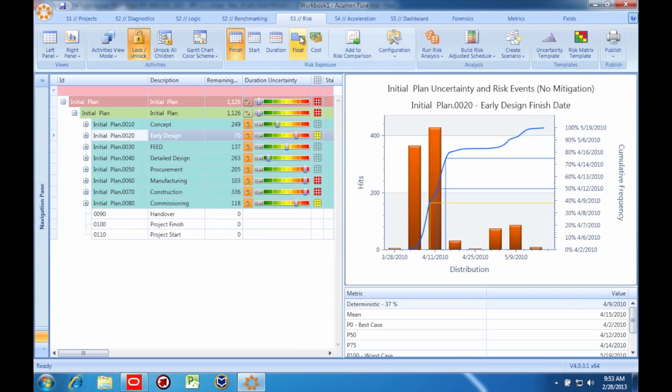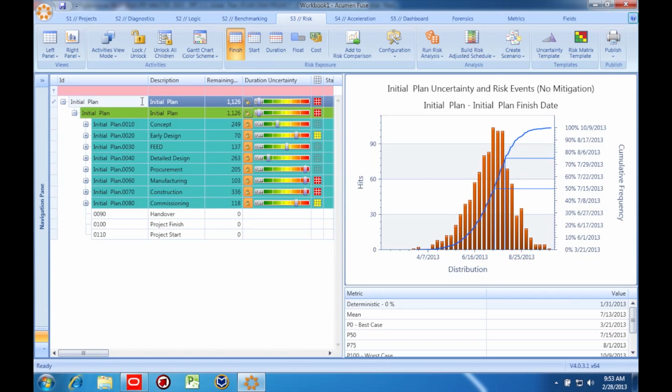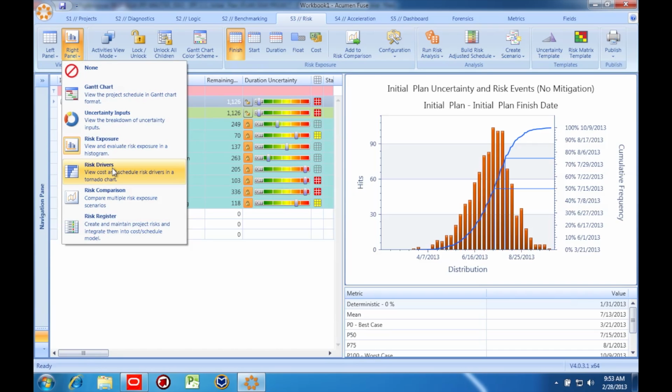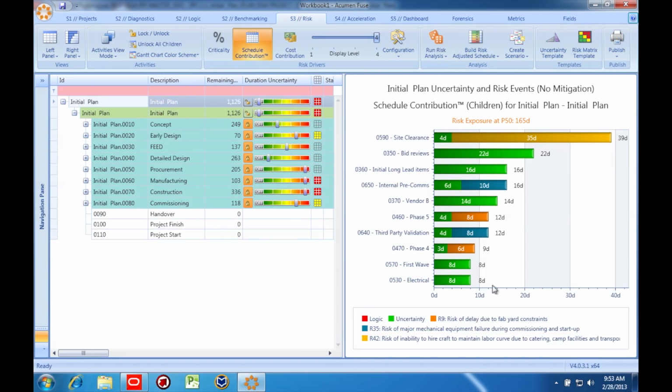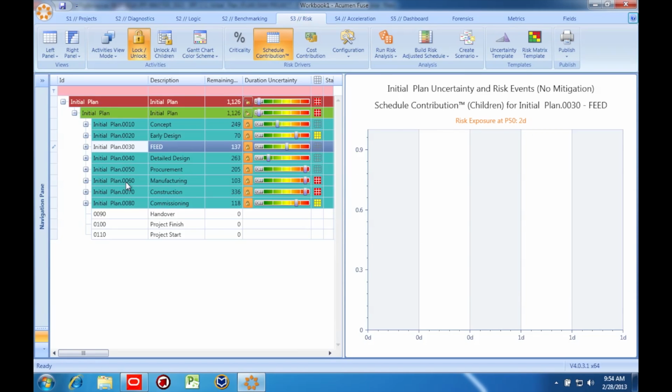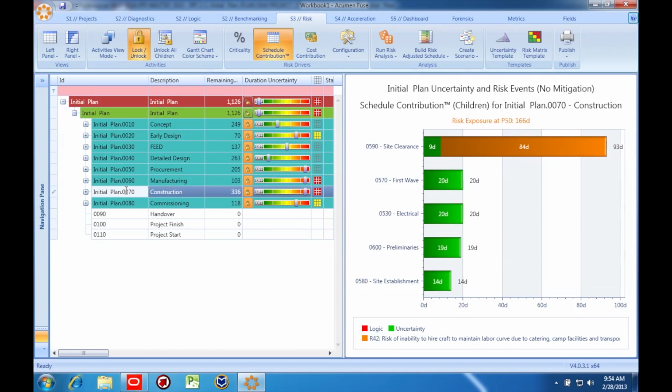With the simulation complete, let's find out which specific risks are affecting us the most. First, at the project level, here's the list. In the risk impact panel, we can see that all risks aren't created equal. Based on the risk attributes in the risk mapping, we can see which risks are causing the most predicted impact to scheduled tasks. We can show this at the project level or at more detailed levels in the schedule. Each section of the WBS gets its own chart.